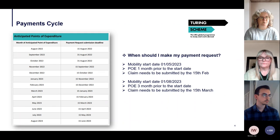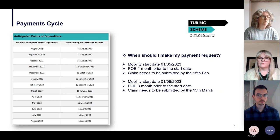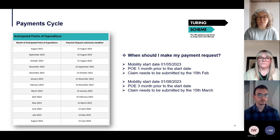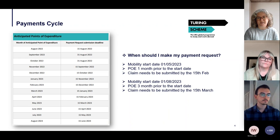The best time to submit your payment request is just before the deadline of the 15th. If you miss the deadline, that claim won't be processed until the next deadline, so it's important to hit that deadline. Capita then requests those funds from DfE, which we receive about 30 to 40 days after, after which we'll release those funds to yourselves. This is why it's really important to understand the lead-in times and how your point of expenditure affects the timing of your claim.